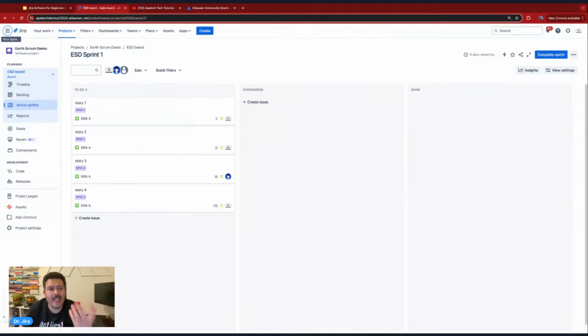You'll notice that the issue I just created doesn't show up on my board. That is because the fundamentals of Scrum are different from those of Kanban. What makes Scrum unique is that your board shows you an active sprint, which means you have literally created these blinders. Sorry, having an existential crisis here. You create these blinders so that you don't see the noise outside your sprint.